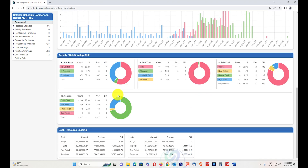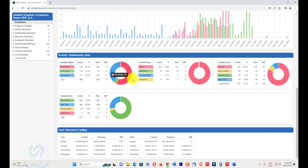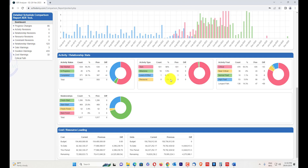Activity and relationship stats are shown next. There are two categories — activities and relationships — and stats for both are provided. Pie charts show the comparison between not started, in progress, and completed activities for current and previous. Activity types — task dependent, milestone start, milestone finish, level of effort, and resource dependent — are also shown. Activity float categories such as critical, near-critical, normal float, high float, and longest path with their changes are visible here.